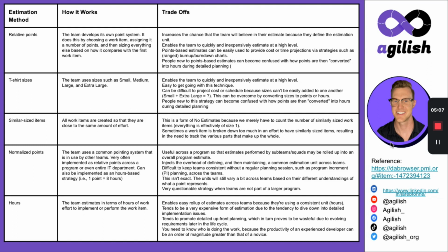It can cause extra overhead because you have to maintain these across the teams. As teams continue to execute, there are new team members and different perspectives, and you're thinking of it and changing it. Is this relative estimation? There are some things that can be confusing as you continue forward. So there's some kind of cross-team sync that would probably be needed, like big room planning or program increment planning, to make sure that you're realigning the teams at some kind of cadence.